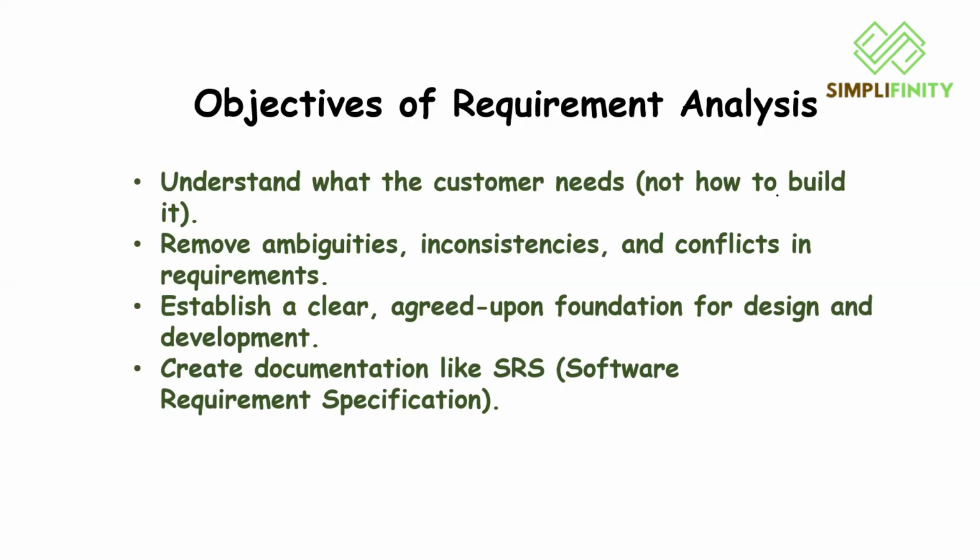So that's right. So establish a clear, agreed upon foundation, which I just talked about, for design and development. Then at the end, you're going to create documentation like SRS. So this is about the software requirement specifications where you actually draft all the things that they said and the things that you will be providing. So it's like a written document or proof so that they cannot just argue when the product is done that they wanted something else and you built something else.